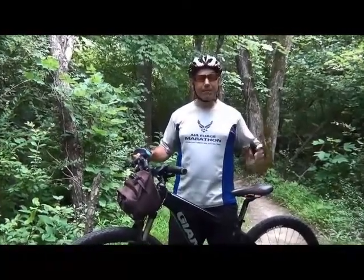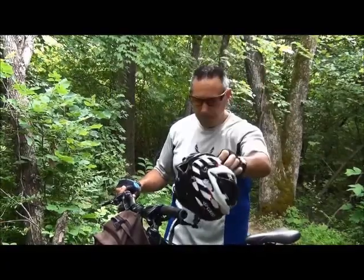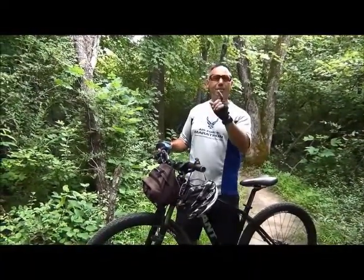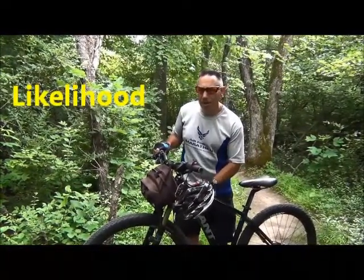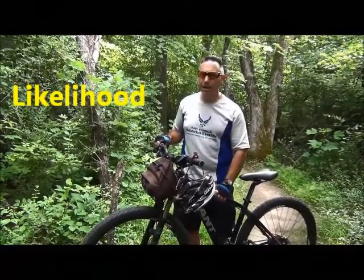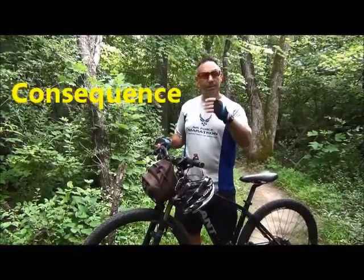First thing you've got to do is identify the risks, and that's what I didn't do a good job of doing. One risk I did identify is if I fall, I could die if I hit my head. So I mitigate the consequence of that risk by wearing this helmet. Always wear your helmet when you ride. It's the second risk that got me. The second risk was what happens if I get a flat tire. If I get a flat tire, I could be stranded. The likelihood of me getting a flat tire, putting about 1,000 miles a year on this bike, is actually pretty high. The consequences, I might get stranded.